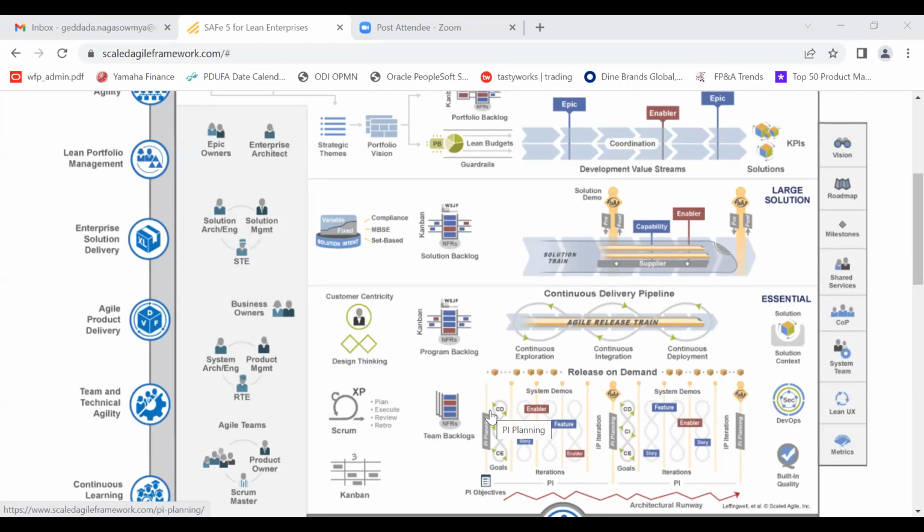Whatever you develop has to map to your business case. This group keeps getting the business initiatives and will review and analyze them. If one is approved, then it will go under the program backlog, so this backlog should get implemented with the program backlog. The management of portfolio epics is done at the value stream level. If it is adding value, only then are you developing this epic. If it is not adding value, not addressing the risk, or not providing any cost benefit, then definitely you're not going to work on it anymore, right?